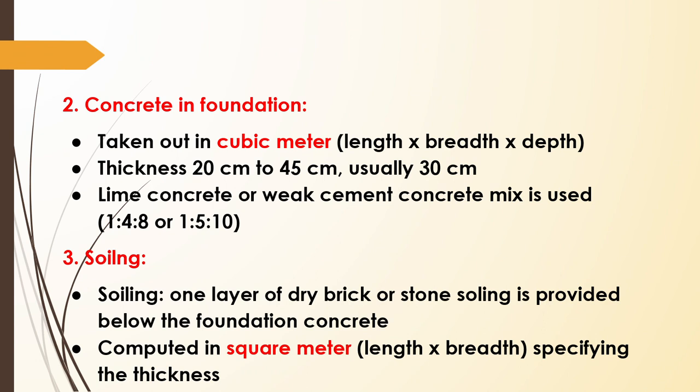So what we are doing is after doing that earthwork, we will first do soiling. In the below portion of the foundation, we will provide one layer of soil, one layer of dry brick or stone soil is provided. Okay, a layer of soil is provided. The unit of that soiling is square meter, that is length into breadth of the foundation is taken. So that is what soil will be filled.